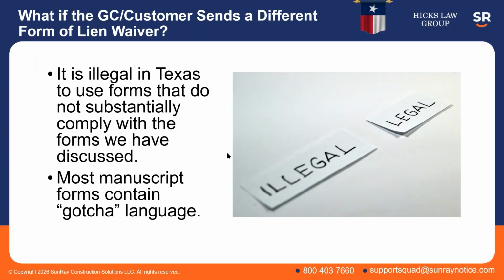Now, if it's state or local government jobs or federal jobs, it's still the Wild Wild West. Can they technically use their own crazy form if it's state or local government work or federal government work? Yeah, they can. What's my advice to you? Take their form, throw it away, use the statutory form anyways. If they squawk about that, that's when you have to have a discussion with them about how what they've asked you to sign really isn't fair, for all of the reasons we'll talk about.